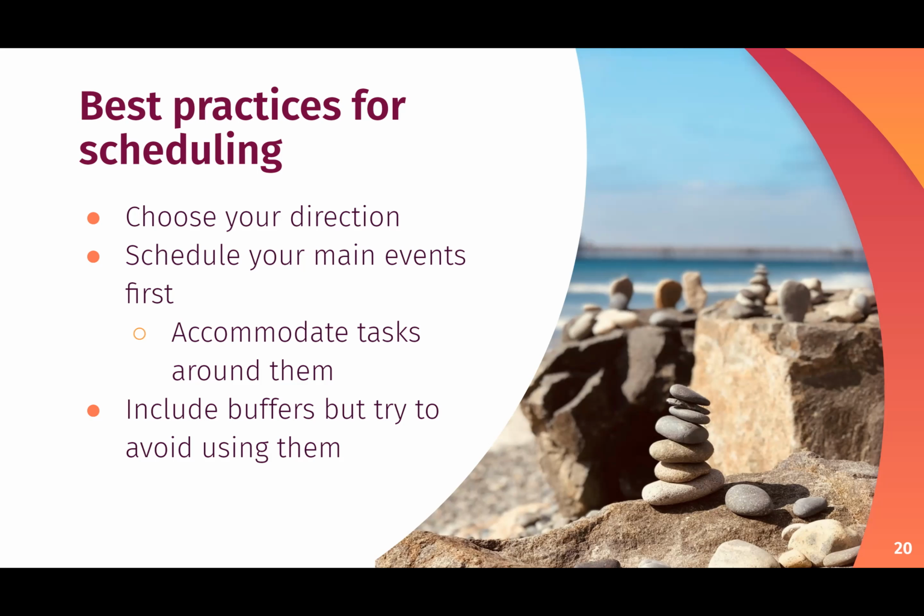So I'll give you an example. I mentioned I'm working on a book right now, and I have other authors writing chapters for the book, and I gave them a deadline of July 10 for the first draft. Now, I know that if I don't get them on July 10th, it's totally fine, because I have included a buffer for me to work on those chapters and to think about when I need to have those first drafts edited.